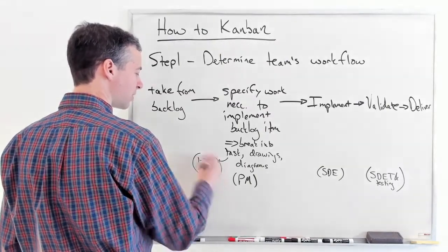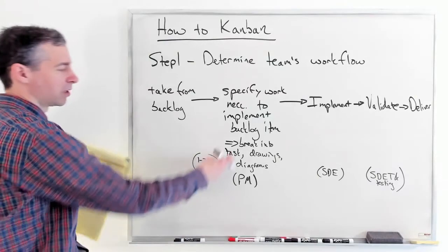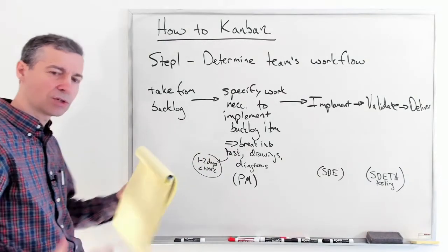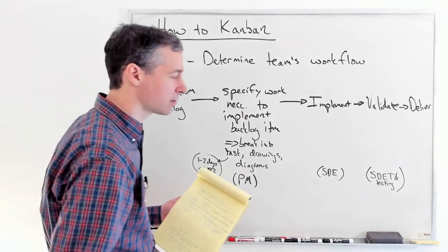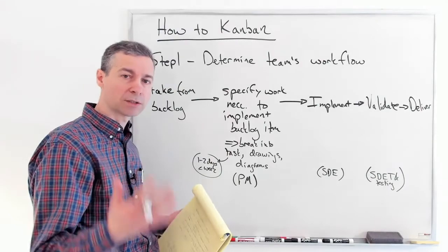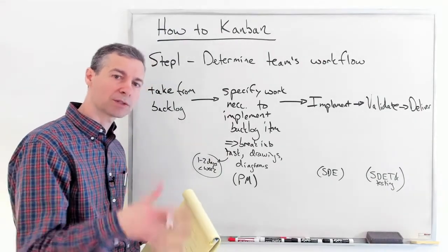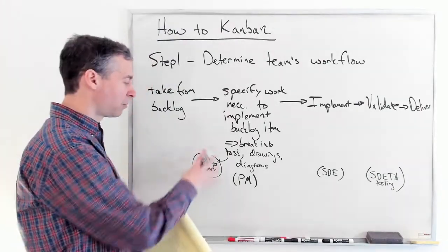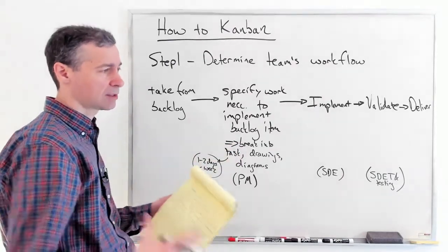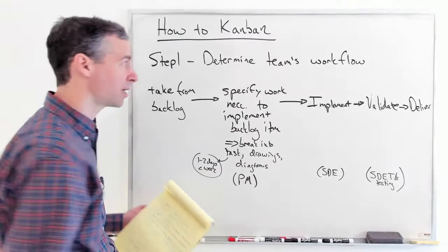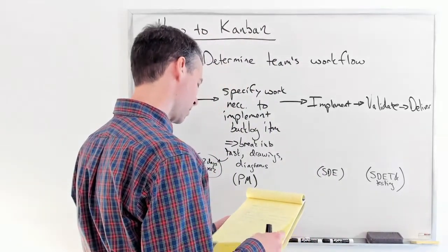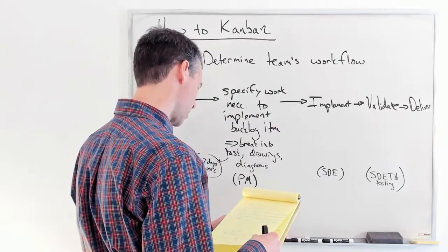It depends on the scale that the team is working at, but the normal notion is that the tasks should all be roughly about the same size, because Kanban is going to monitor its progress and be able to make estimates when things are done based upon the number of tasks. And so the tasks should be approximately the same size as created by the people specifying them, the program managers.